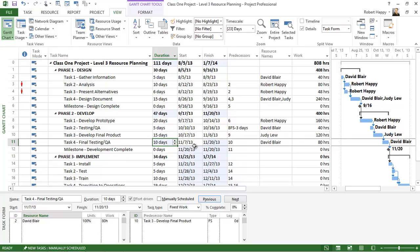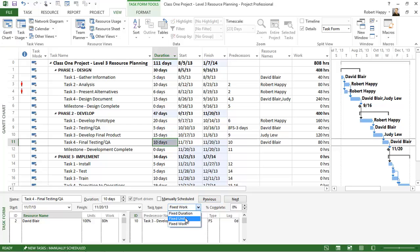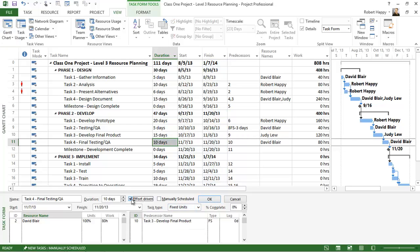So effort-based scheduling is really all about fixing the effort. Now you can accomplish the same type of approach by choosing fixed units, and when I choose fixed units, notice that I can turn effort-driven on or off. That means, do you want the effort to be fixed as well as the units, and that gives you the ability to have an effort-based approach.